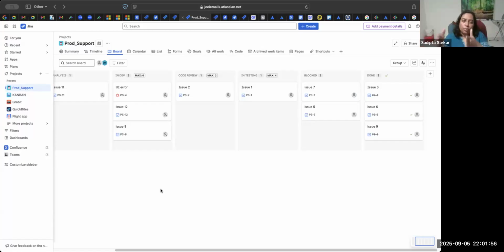And like B2B or B2C, accordingly we have to create the Kanban boards. If we're clustering them, then different countries. Ideally, one board will be for one customer. If you have one board for multiple customers, then it's going to be a hodgepodge. But you can still use labels to identify it. But it's going to be very tedious to handle.